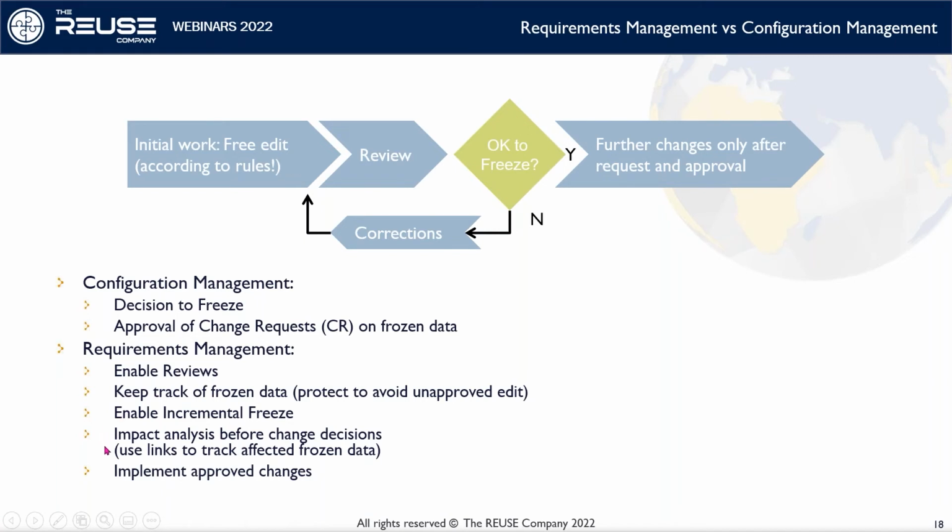We could also support with impact analysis before changes. Now, if we would change this requirement, we should also redo this verification, and it will have these effects on business requirements and so on and so forth. After change approval, changes should also be implemented in the database.